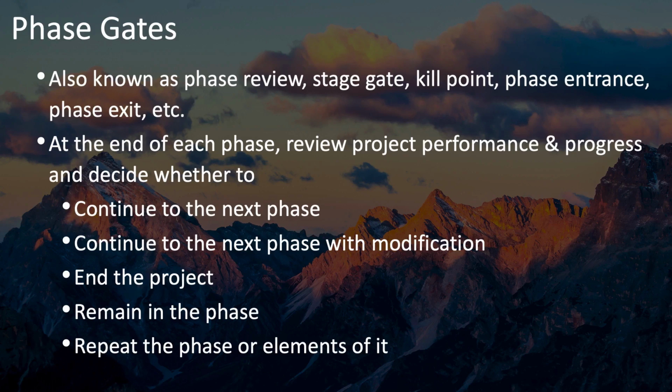A phase gate can have various names depending on your organization or industry. It could be called a review or a stage gate rather than a phase gate, or a kill point or a phase entrance or exit. But whatever it's called, it has this same purpose, and that is to review the work of the previous phase and to make a decision whether to proceed or not. A go, no-go decision.